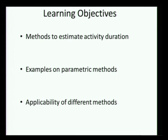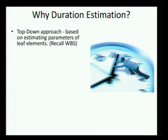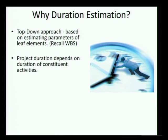We have covered quite a few topics so far. When we did bar charts, we had to use duration. We are now going to see how we can actually calculate the duration of these activities. Why do we actually need duration of an activity? One reason is to calculate the whole duration of the project. In the work breakdown structure, the leaves are activities, and only when we calculate duration of these activities can we calculate project duration.